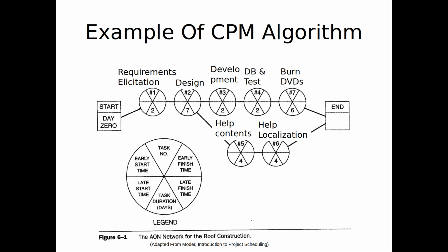Okay, now, this is where the max comes in. Remember I was saying before? You have to be considering the max of any time. Like, you're going to be in the shower, you're going to be boiling water. When is the earliest time you can finish both of those? It's a max of those, yeah? Those early starts. So what's the earliest time the entire project could finish?